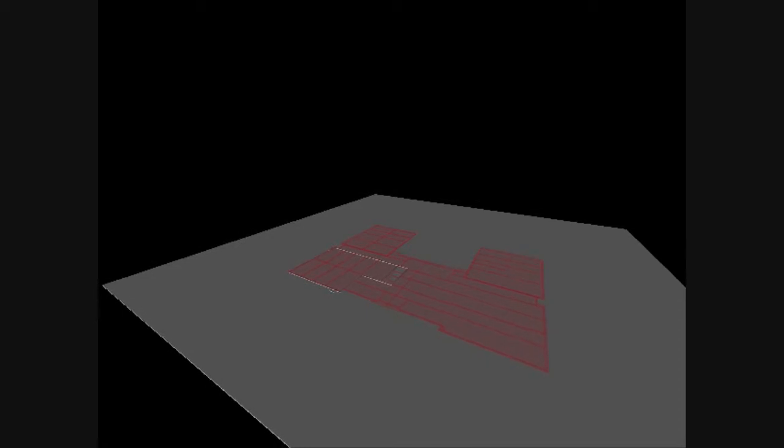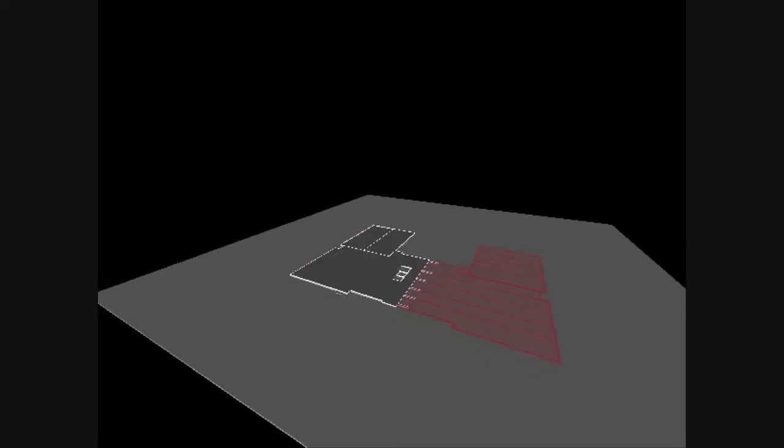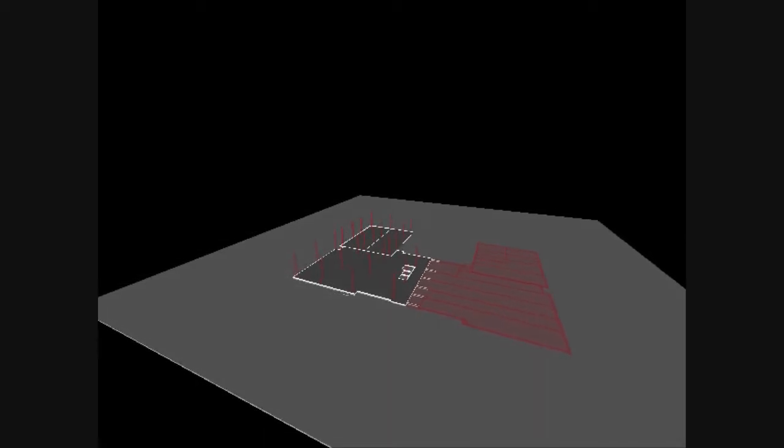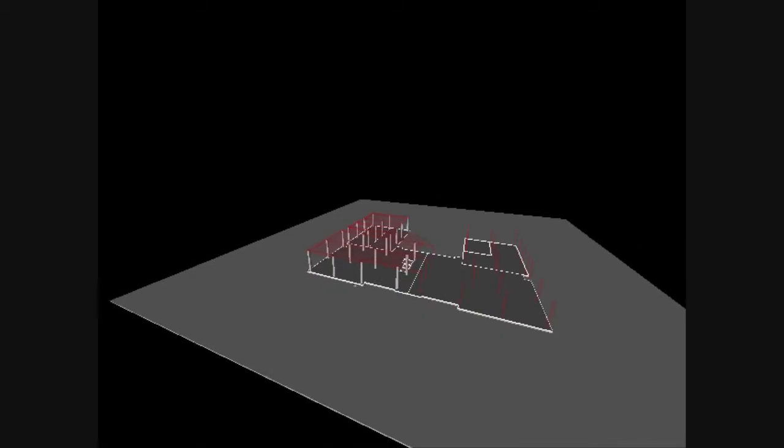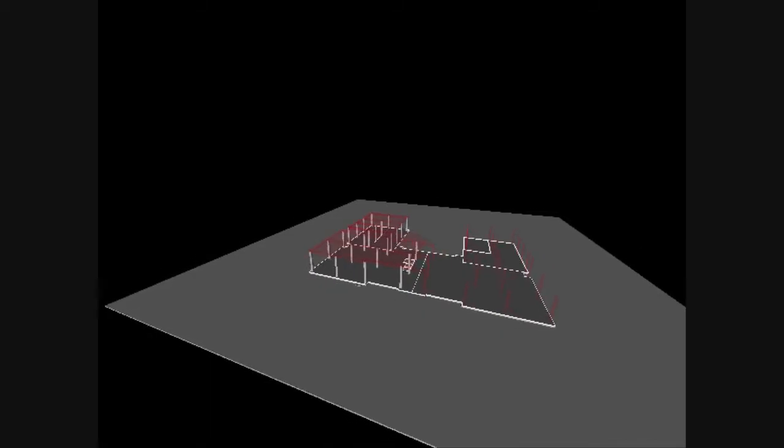The building will be divided into north and south for the remainder of the structural concrete construction. The north slab will be poured first, followed by the south. After the north slab has reached proper strength, the north side columns will be formed and poured for the first floor. This will occur simultaneously to the south side slab construction.